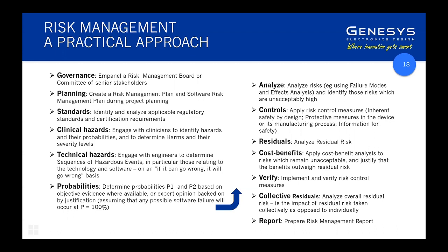And it's really important in this to put a common sense filter over the top. I like to gather the governance panel and say, well, we've said that these risks are the high risks, do you concur? And are there any risks that don't come up as high risk that you think should be high risk? So just apply a common sense filter over the top in case the analysis has given a result that doesn't gel with people's experience.